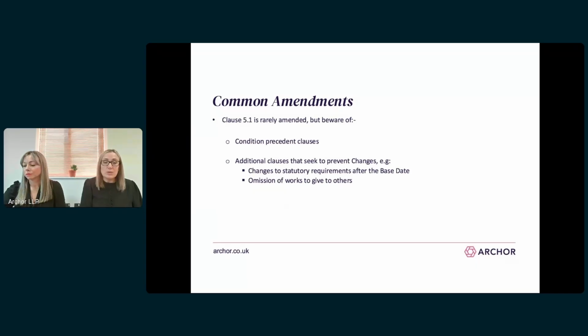So moving on then to common amendments to the JCT change provisions. Clause 5.1 itself is actually rarely amended, but there are several other clauses within the contract which deal with changes, and they are often amended. Three that I want to quickly look at today are condition precedent clauses, clauses that deal with changes to statutory requirements after the base date, and bespoke clauses that deal with omissions.